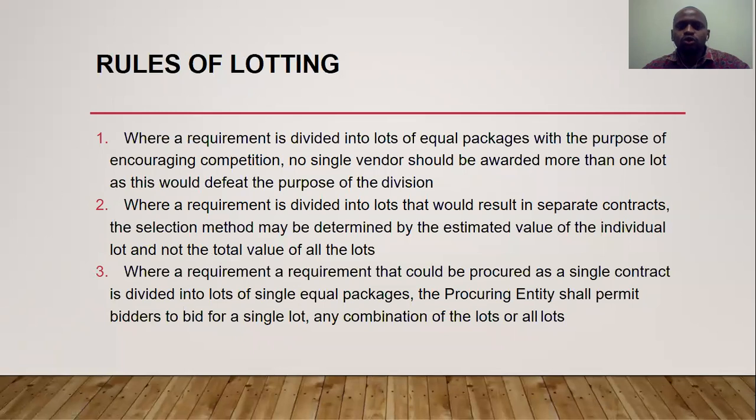So what are some of the rules of lotting? Number one, where a requirement is divided into lots or equal packages with the purpose of encouraging competition, no single vendor should be awarded more than one lot, as this will defeat the purpose of division. So no given contractor should be given more than one lot.